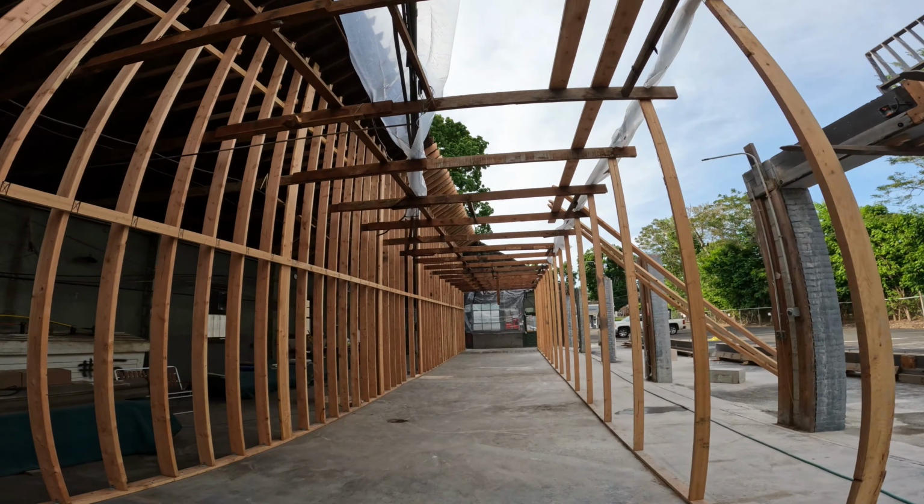So we are gonna build the rest of this wall Tuesday, and then Wednesday and Thursday potentially we'll demo these rafters, do what we did over here, you know, shore up this conduit, everything we did over here. We're just gonna catch up on this side, and then I'm thinking Thursday or Friday hopefully we'll be ready to cut these headers out, and then by the time the metal's ready, we'll be ready to put the whole thing back together in one shot.